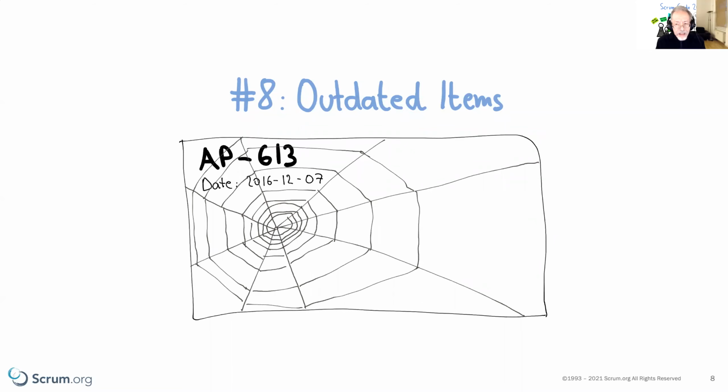It's a bit like the approach that Basecamp is using for dealing with bugs. They either fix bugs immediately, or they ignore them. They're not administering them. And this is my suggestion too. Don't use the product backlog to administer product backlog items that might be valuable sometime down the road. My suggestion is, again, put them somewhere else, or even better, delete them.